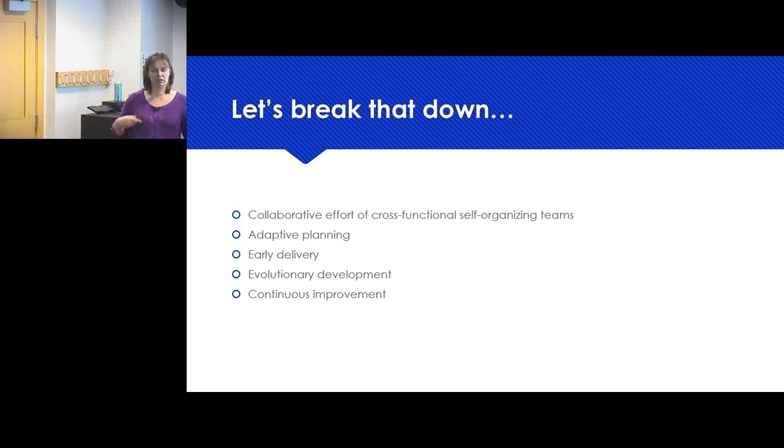And every week we try to look back and ask, what worked, what didn't work, instead of at the end of the project, where a lot of places will look back at the whole project and figure out what went well and what didn't. At that point, it's too late. The project's done, and you're probably not going to take those learnings on to your next project. You might, but it's more likely that you're going to take little changes as you're moving along, and you'll keep making your process better and make it work for you and your team. Because what works for one team might not work for another.